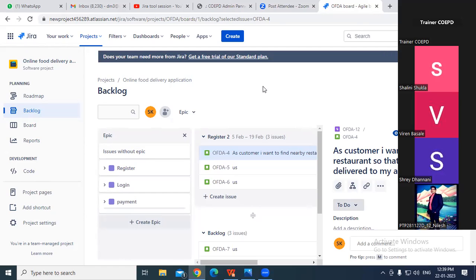Can we take more than that? You can take more. Industry states a minimum of 3. You can have more than 3 for sure. So it is dependent upon the capacity of the team? It depends on everything. There are many factors that are dependent here, Shalini: priority of the user stories, priority and requirement of the client, velocity of the team, availability of resources, availability of the budget. Many factors will be considered for you to decide how many user stories will come.